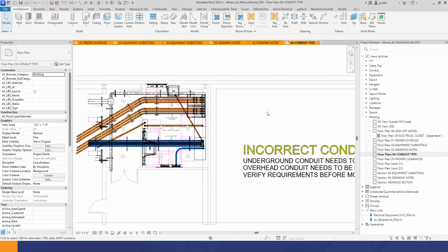And so it depends on a lot, availability, and this even gets into... I would say the non-answer to your question is it's kind of like the field team, right? So they'll ramp up as time needs, and BIM can potentially ramp up and down as needed because I may be on a project where early on I only need to spend 16 hours a week on it.